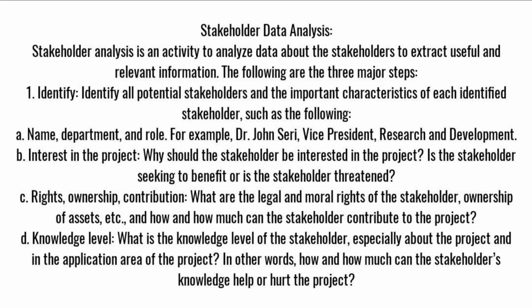Stakeholder data analysis. Stakeholder analysis is an activity to analyze data about the stakeholders to extract useful and relevant information. The following are the 3 major steps. 1. Identify. Identify all potential stakeholders and the important characteristics of each identified stakeholder, such as the following. A. Name, department, and role. For example, Dr. John Sari, Vice President, Research and Development. B. Interest in the project. Why should the stakeholder be interested in the project? Is the stakeholder seeking to benefit or is the stakeholder threatened?